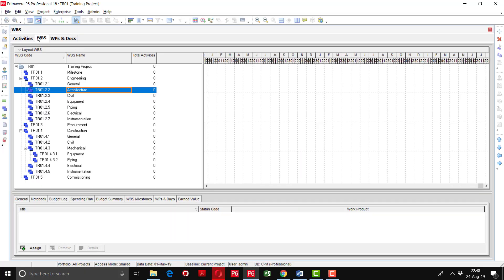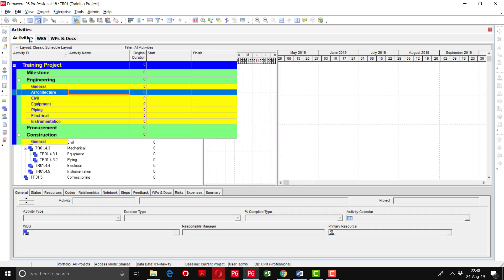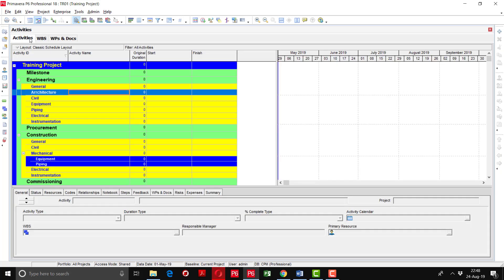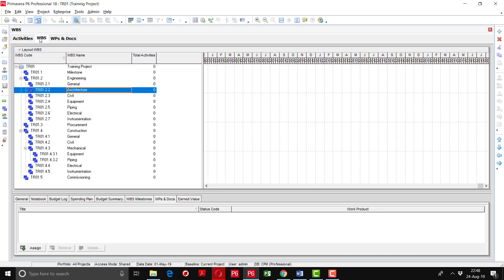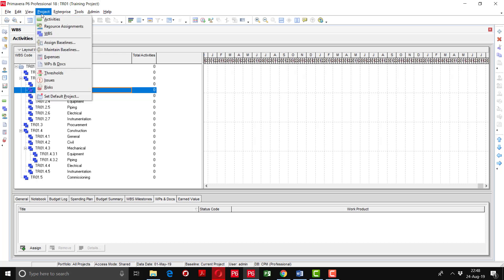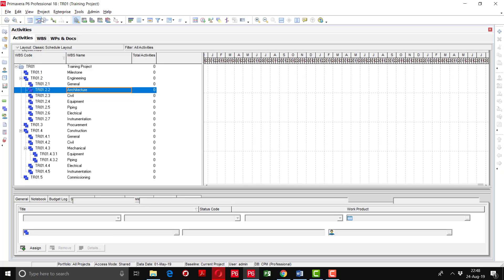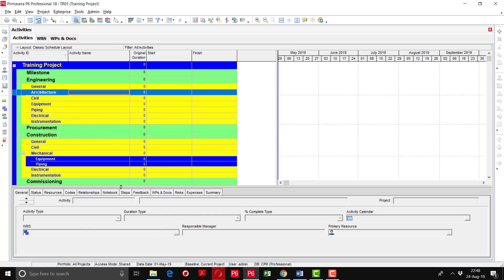After the creation of the WBS, I will now show how to define activities. Go to the Activities option, which can be selected from the left side toolbar by clicking the Activities button. If you have the WBS window open and want to switch, go to Project and select Activities. The Activities tab will open showing the existing WBS, under which we will create the activities.